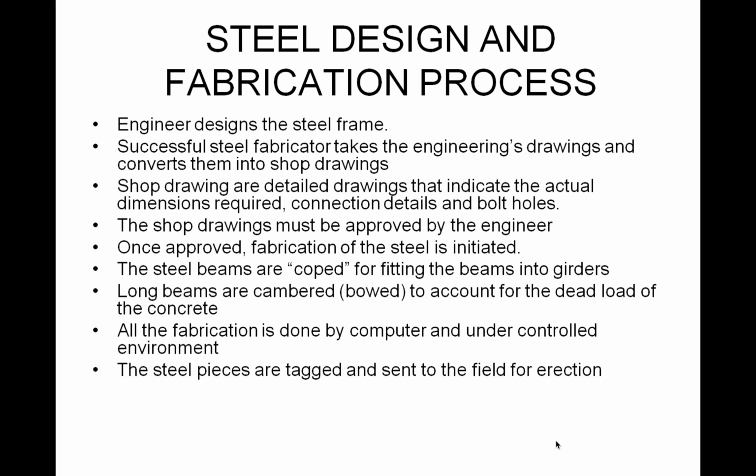All right, so those drawings get developed from the design drawings that get sent back to the engineer to make sure that they look and have everything that are needed as per the contract plans. They get approved by the engineer. Fabrication can then start. And then, there's a whole inspection process that they go through before they're shipped out to site.